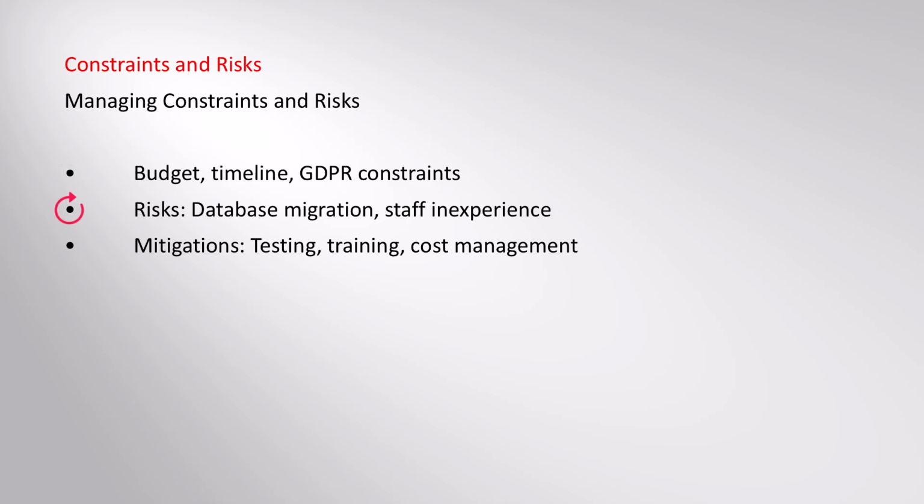Limited staff expertise in Azure is addressed through budgeted training. Risks include potential database migration failures, mitigated by sandbox testing with Azure Database Migration Service. Staff inexperience is countered with Phase 1 training. Cost overruns are prevented using Azure Cost Management and reserved instances. These mitigations are documented in the risk register and reviewed during stakeholder workshops.